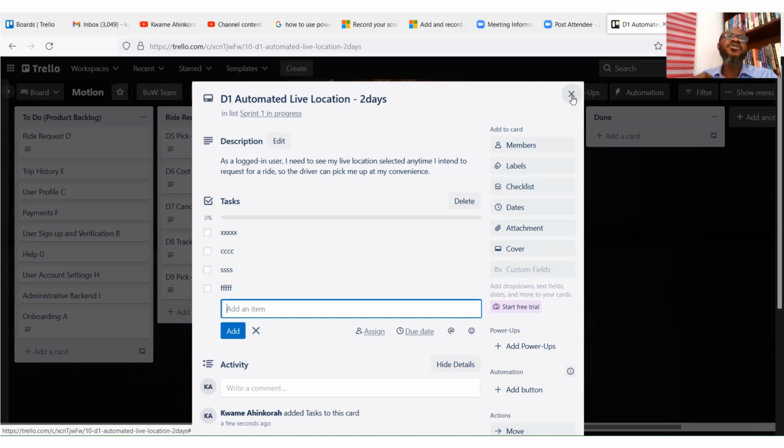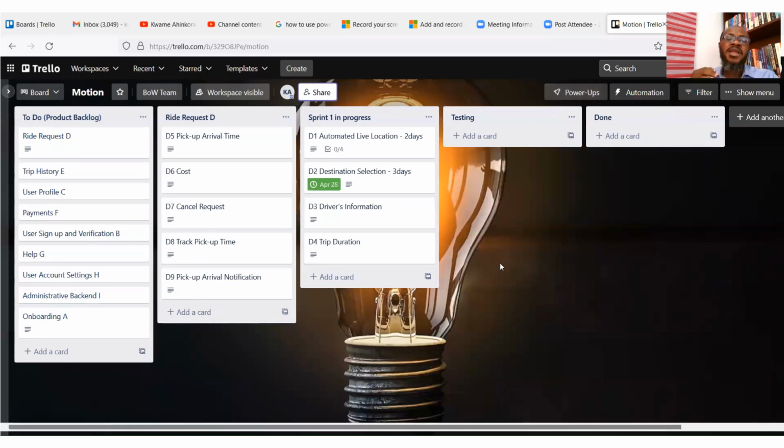And whilst executing is ongoing, they perform the standard meetings. Remember the daily standard meetings? Just so that everything is going according to plan. Remember the 3 questions that I asked during standard meetings. What were you able to accomplish yesterday? What do you intend accomplishing today? What obstacles lie in your way? Those 3 questions. They conduct the daily stand-up to ensure that things are going according to plan. Remember, the Scrum Master leads these daily stand-up meetings, all right?